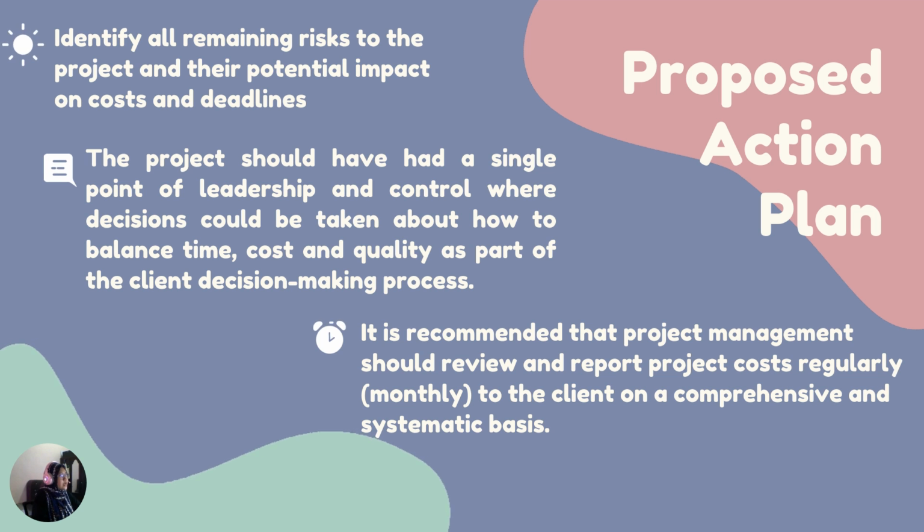Next, the project should have a single point of leadership and control where decisions could be taken about how to balance time, cost, and quality as part of the client's decision-making process. And lastly, it is recommended that project management should review and report project costs regularly to the client on a comprehensive and systematic basis. That's it from me.